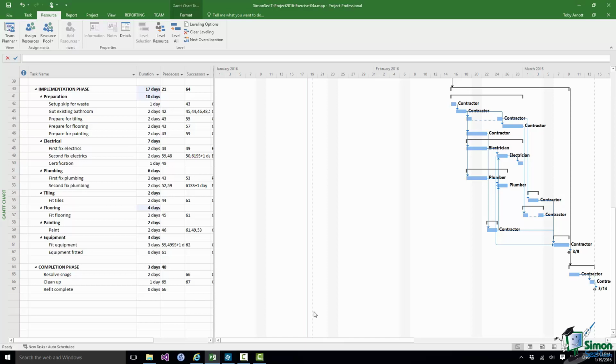So given this one contractor and given the electrician and the plumber and the plan that I've got here, I can stick with those resources and it will delay the end date by about 10 days. So that's the first part of the exercise. If you get a slightly different date to that, bear in mind it could just be the way that your weekends are falling, or you may even have put some public holidays in, but more of that later on.